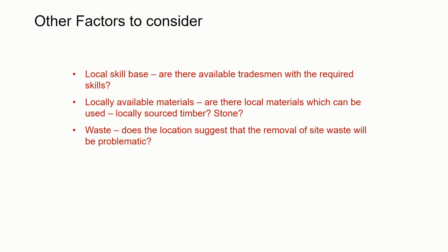So it's not unusual to think before the project has started, while you're busy planning the feasibility stage, to think ahead of where you might put skips and site huts and comfort facilities on a building site before you've even thought about what the building does or how it's designed.